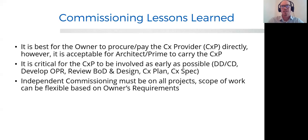So if you think that piece of equipment as it shows up is perfect, you better think again. So commissioning is extremely important for that down the road aspect to ensure that you've mitigated any of that risk, but that you end up with a building that performs the way you want. The only way to do that is to actually test it, right? Simulate that sequence of operation and then check either does it pass or does it fail?